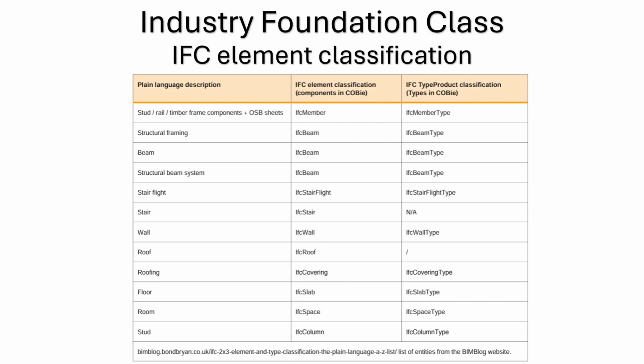So if you're a quantity surveyor, you need to know what objects you need to purchase for each room, because that room will be finished first, so that'll have to be fitted out first. Like the televisions, the monitors, the carpet, whatever, it'll all be tagged as being in that room. Same as a facility manager, with maintenance schedules, they'll want to know what objects they have.